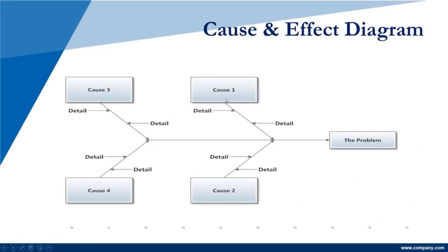If I had this as a cause, if it was a root, would it be draining at all? Would it have standing water, etc.? So a cause and effect diagram allows you to decompose, break into pieces a problem, so it's easy to see where it may exist. It also works on the theoretical, so you can theoretically have a problem and you can decompose it and look at it in the what-if scenario.